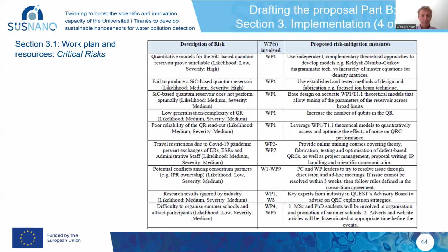Oh, and by the way, when you're talking about this risk, it's not enough just to say this is what it is. I want you to specify what the likelihood of that risk occurring is. Is it low, medium, high, and also the severity of that risk? So if it happened to occur, would it be disastrous, or would it be of minimal impact? So again, low, medium, high.